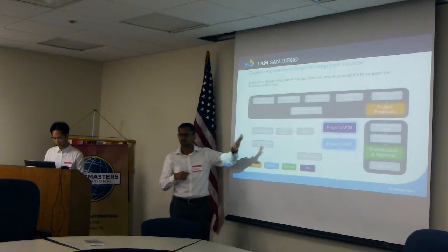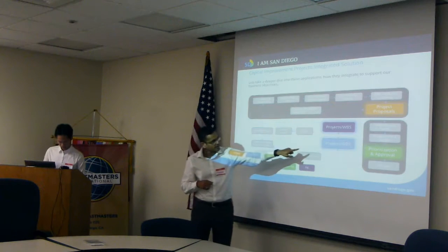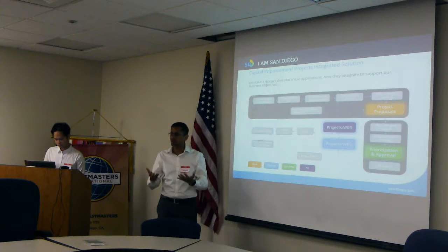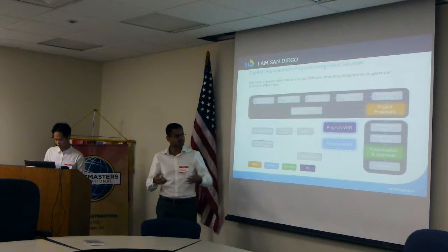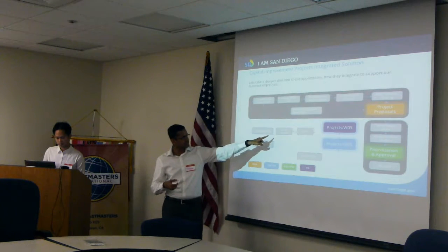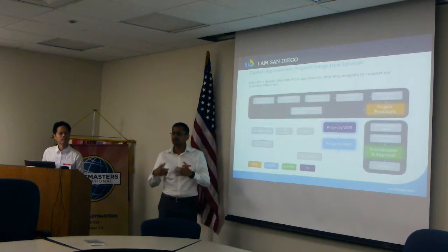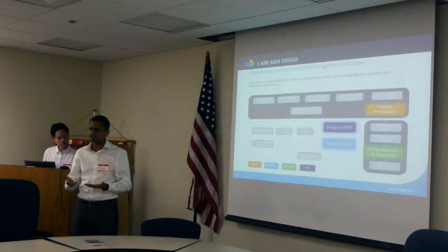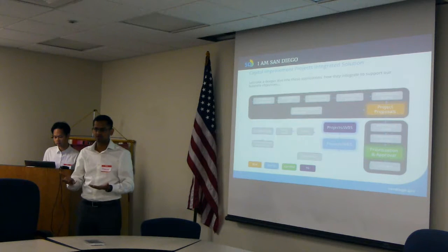the existing landscape. Now, in project systems, you execute the project. You would have vendors working on the particular project. You would post time charges. You would have costs put in onto the project. Goes through its life cycle, and at the end, you would see that it feeds into a fixed asset, where you go ahead and either repair that asset, replace it, or refine that particular asset with something else, like replacement, extending the lifespan of that particular asset by performing some actions.